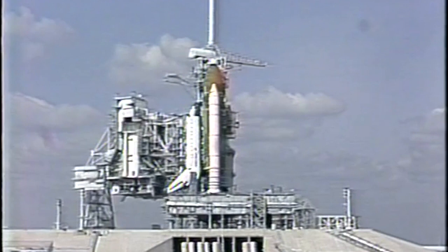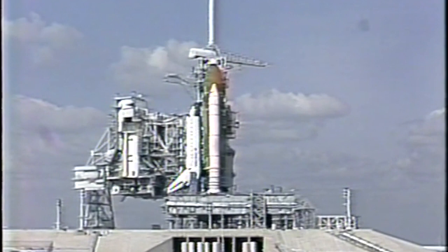We'll go right into sequence 17 for the recycle back to T-minus 20-minute configuration. We'll do a quick on-net debriefing, and then all systems will be released to their normal command channels for system securing. One thing I would like to mention, if we do cut off after ops transition and prior to SSME3 start command, that will send us directly into sequence 17.